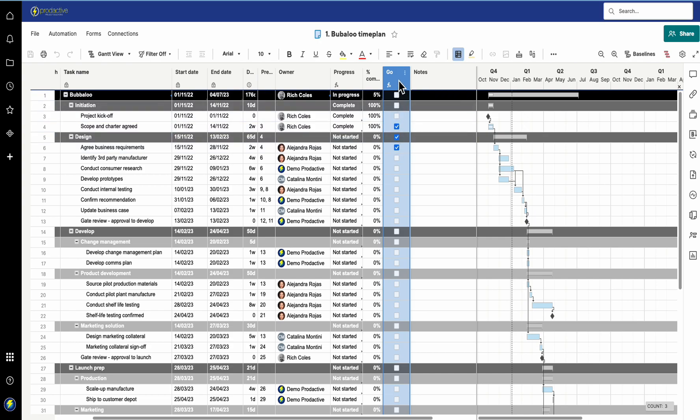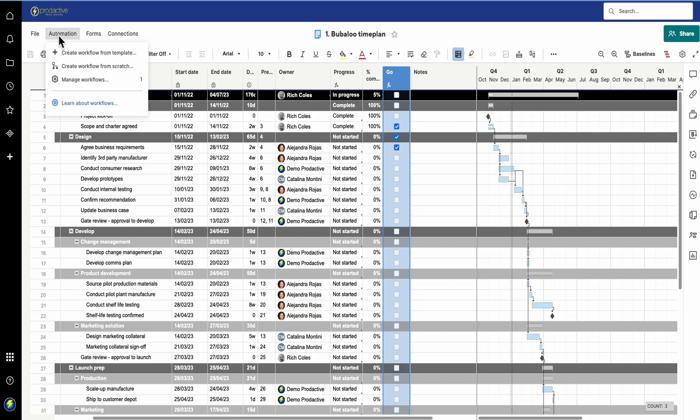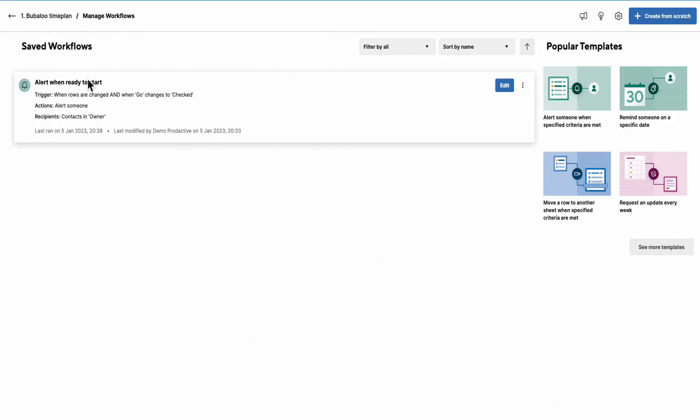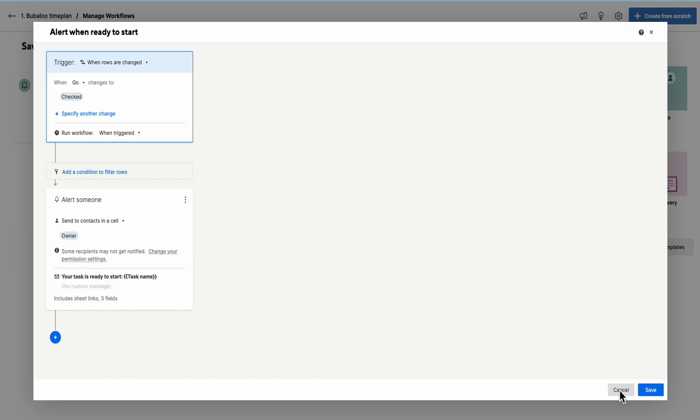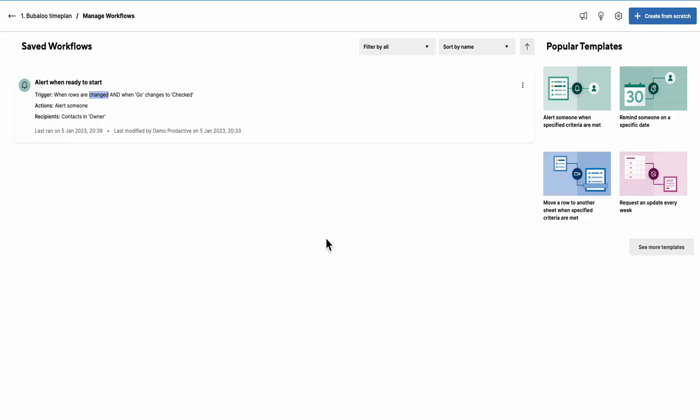You can have this column visible or hidden - it's just going to trigger an automation. If I go to manage workflows, you can see it's got an alert called "ready to start". When "go" changes to checked, it's going to send a note to the owner saying your task is ready to start, and it's going to insert the task name and send a few fields including start date, end date, and task name.